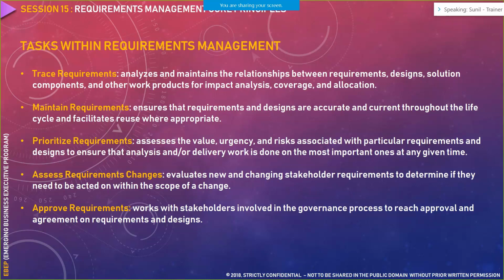After the system is delivered, the customer comes to you and says, we have received an updated system based on the requirement which we gave. Can you tell me where you have documented that requirement? Since you have not documented that requirement, and have directly instructed the development team to update it, there would be a clash. In order to avoid that clash, you need to ensure that all your requirements are always up to date based on whatever we are developing in that particular system context.